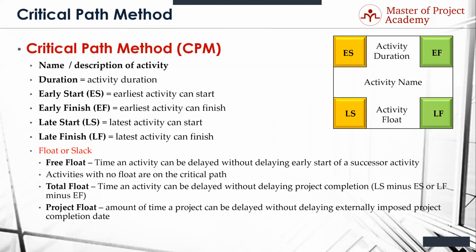Here's an example of that. Let's say you have a project and it's to, I don't know, install new hardware in all the admin buildings by the end of the year. So you have an externally imposed date of the end of 2019. But you look at your project plan and you realize that, you know, today is February 26th. I can get this done by, I don't know, April 15th. Okay, so everything from April 15th to the end of the year is project float.